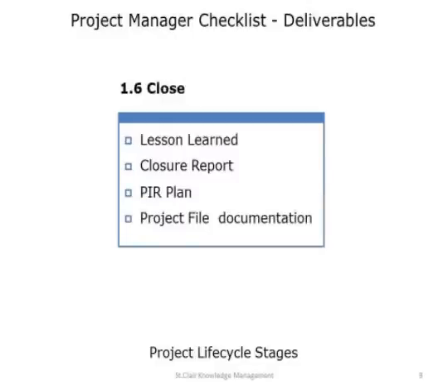The final phase is the close phase. So the main documents produced here are your lessons learned report, your closure report, your PIR or post implementation review plan, and finally the project file documentation.